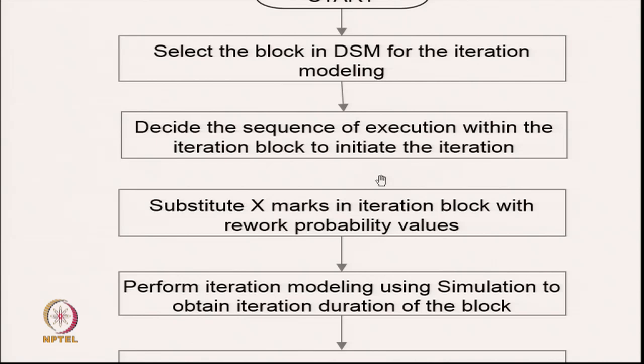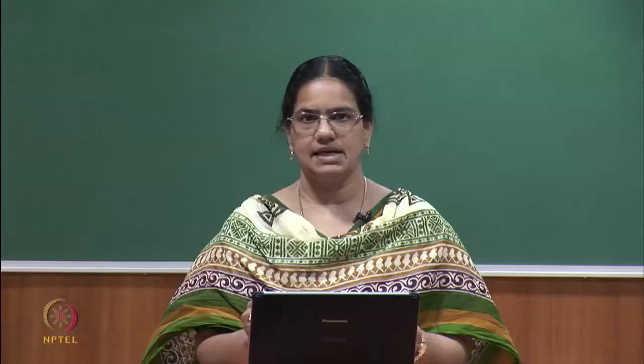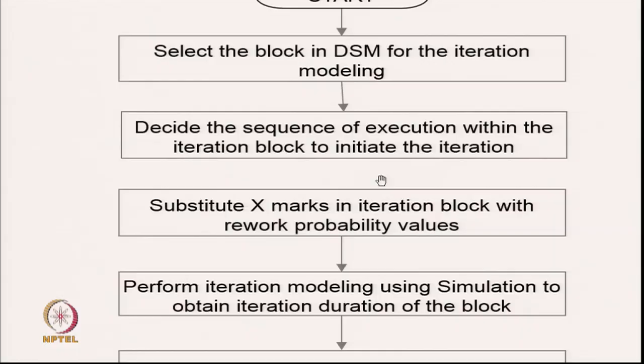You should decide whether the sequence is ACEF, CAEF, or CEF AE - whatever it is, decide the sequence of execution, which implies tearing has to be done. Then substitute the X marks in the iteration block with the rework probability values. In the example shown, there are so many X marks - you should know the probability for choosing an assumption and how much rework will happen in those activities and successor activities.